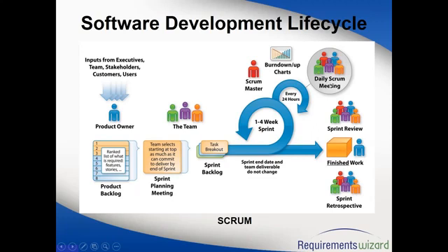So what will happen is every day the team will come in and meet for like 10 to 15 minutes, generally in a hallway or coffee room or somewhere. It's not a very formal meeting. It's a very informal meeting. But the idea is to bring the entire team in one place and tell them 3 things: what they did yesterday, what they will be doing today, and what are the issues or the impediments they are facing.